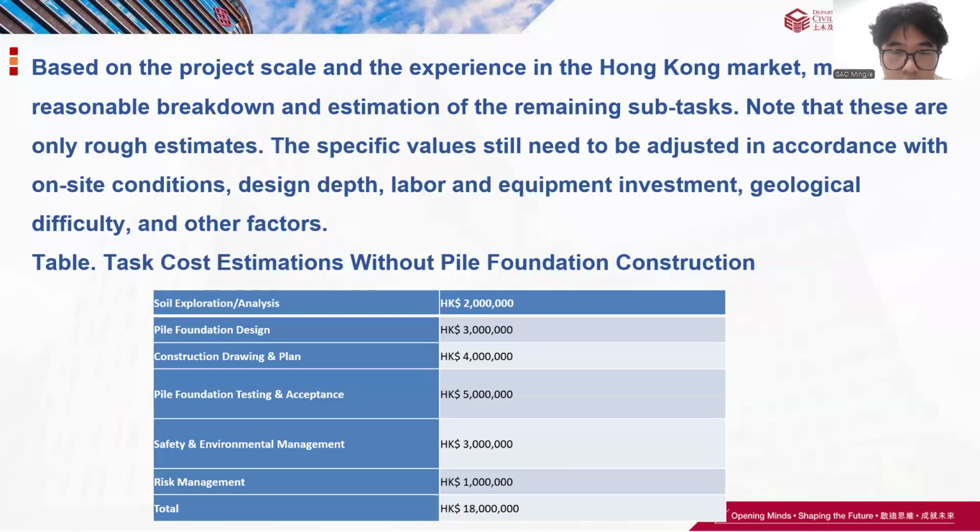The drilling cost calculated by the two methods shows significant differences. The cost reported by RLB is based on the total contract price for large-scale projects, from economies of scale, while the ownership and operation cost method only calculates the ongoing expenses for the daily operation of the equipment and does not include one-time large investments. Therefore, the latter result is lower.